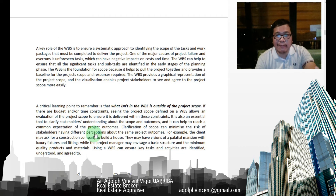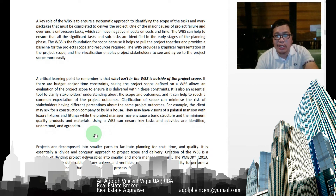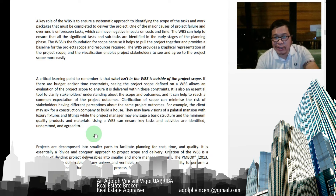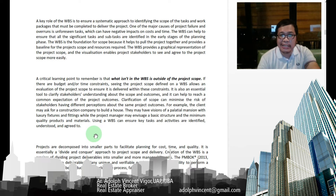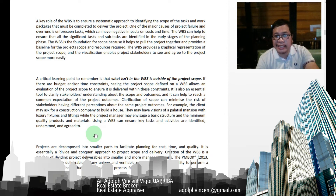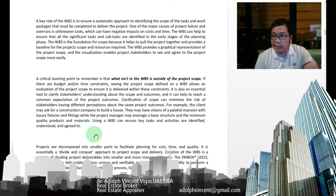A key role of the WBS is to ensure a systematic approach to identifying the scope of tasks and work packages that must be completed to deliver the project. One of the major causes of project failure and overruns is unforeseen tasks, which can negatively impact cost and time. The WBS helps ensure all significant tasks and sub-tasks are identified early in the planning phase. It also provides a graphical representation of the project scope, enabling stakeholders to see and agree to the scope more easily.